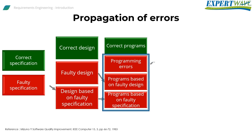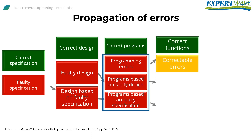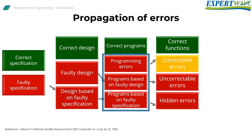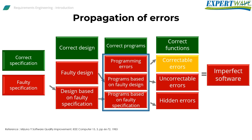Those faults fall into categories: A. Some will be found by the testers and resolved by the developers, hopefully. B. Some will be found by the testers, but the developers might not resolve them — yes, that happens. C. Some faults will never be found by the testers. Therefore, errors propagate. Errors introduced during the requirements phase, if not handled properly, will propagate into the subsequent phases, resulting in a product that is not usable and whose intended use will not be met. This is the importance of making sure requirements are correct to avoid such propagation from the beginning.